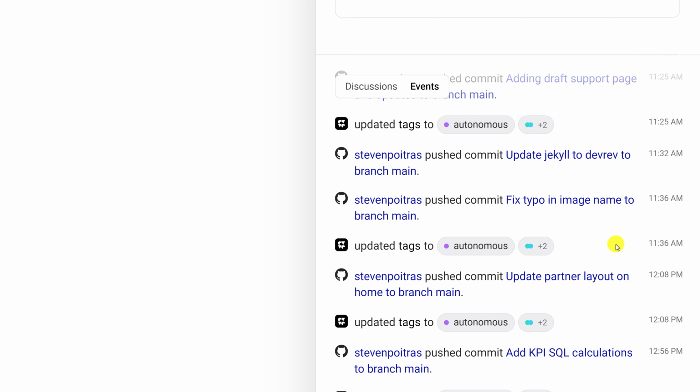A lot of times with traditional platforms, status in the system is completely out of sync with reality just because it requires people to manually go update that status. Now, one of the benefits here is I don't have to update that status, right? I just do my work. I focus on my PRs. I focus on pushing and promoting things through CI/CD. And as it progresses through those stages, it actually updates the status for me. And that is a very, very powerful thing. Like this has been life-changing for me personally.